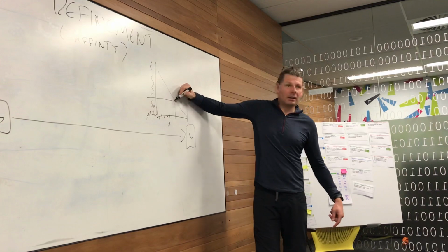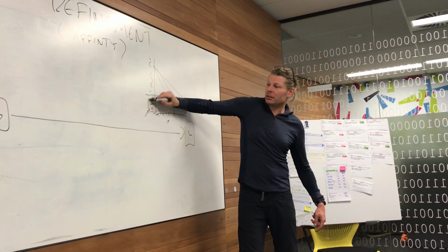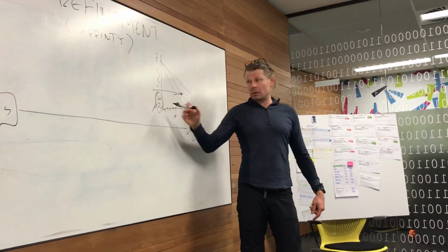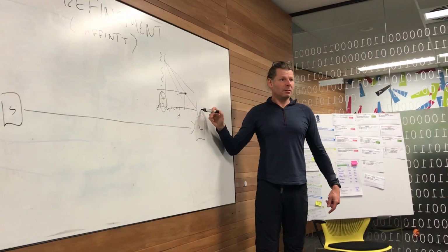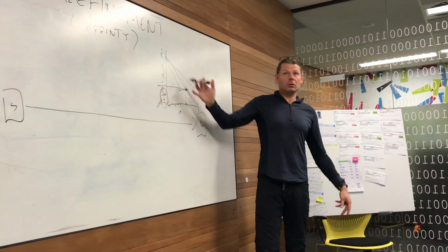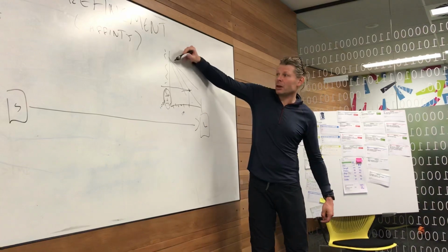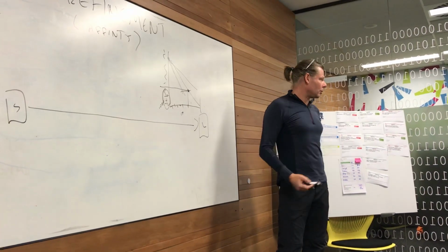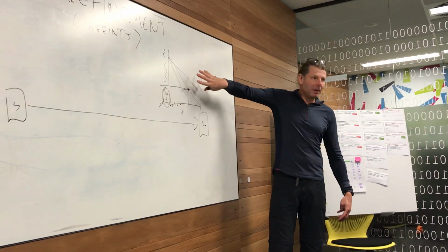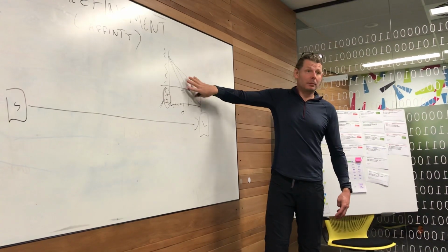Well, of course we can finish then. Give or take some variation, we're probably going to finish around then. But these stories here are now in question. And it's very easy to speak to stakeholders about, you can have something now and the rest later, or you can have nothing now and the rest later, which do you want? And they go, well, you're telling us the truth, this is the rate we're going, can't do any better than that. And there's questions about how we make it steeper, what things do we drop, that kind of stuff, but it makes it a much more honest conversation because we're using empirical process control. We're using yesterday's weather. So that's why it works, and it is really, really powerful.